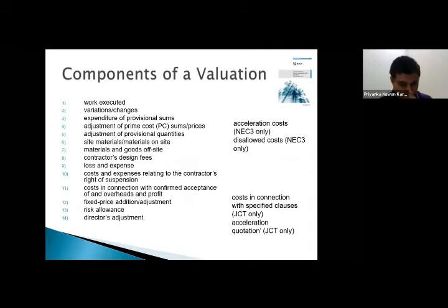Now, I will tell you the reason for having an interim valuation. As you all know, a construction project needs funding. The first mode of funding that a construction project exercises is giving an advance payment to the contractors. An advance payment can be considered as an interest-free loan, because you're not paying any interest on what you are paying.